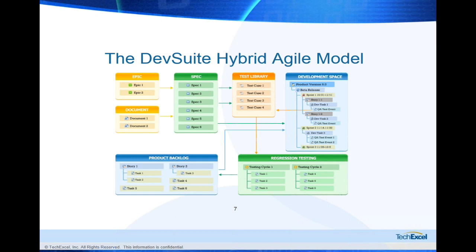In other words, you will encourage the programmers to be doing the quality testing based on defined test cases, and you certainly would encourage programmers and the QA floaters, the term we use to represent the QA members who join the agile team, so that the implementation effort of a story, done by one or multiple development tasks, actually includes the QA testing effort.